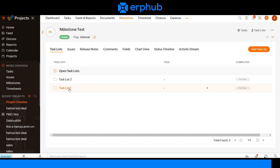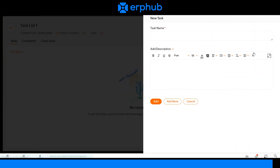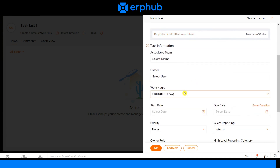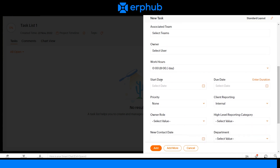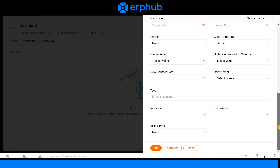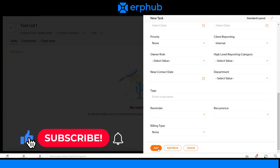To add tasks to these lists, click on the list and then click on add task. Start with a task name. You can add a description to your task, attach files associated with this task, assign owners, adjust work hours, adjust the start date and due date, change the priority of the task, and a lot more. Once you're done configuring all that information, click on add.